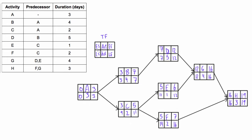If you recall from the previous videos, we can find the total float by subtracting early finish from late finish, or early start from late start. Doing it with starts is called start float and with finishes is called finish float, but it's actually the same number either way. For example, 0 minus 0 is 0, and 3 minus 3 is 0, so activity A has a total float of 0. Activity B: 3 minus 3 is 0, or 7 minus 7 is 0. Total float of activity D is also 0. Total float of activity G is 0, and total float of activity H is 0. You'll see in a minute that these form our critical path — but let's look at the other three nodes.